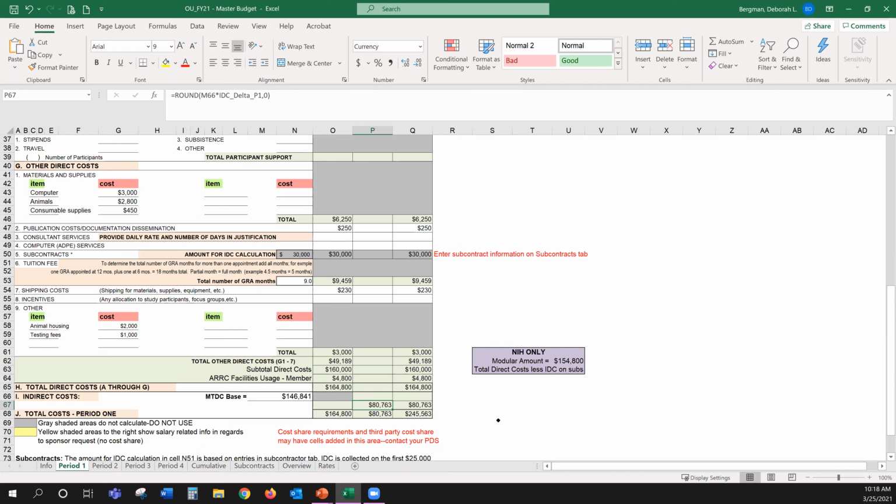We do need something from the sponsor. Either it's stated in their guidelines, or we'll look toward getting something off their website or from somebody at the organization who has responsibility to sign for them. We need something that shows that there is no IDC allowed to be collected. We see that with foundations frequently. Any more questions? Okay.